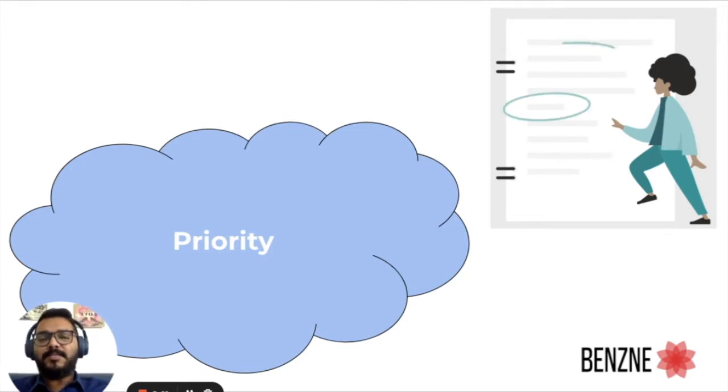While the items in product backlog may not be prioritized for right now, the product owner continuously grooms the priorities based on the business needs or the stakeholders' needs, while sprint backlog are the work items or the list of stories which is prioritized by the product owner for this particular increment.